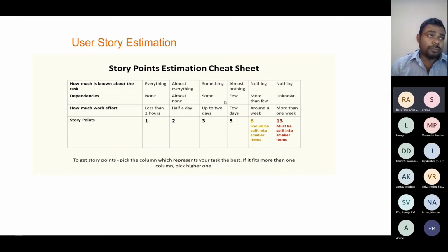So in such a case, if your story point is 5, think that it's big and try to split it, break it down into 2 user stories so that you can make it simpler and easier to test and easier to develop, and it makes the work easier. If it is 2, then it's all good to go. If it falls under 8 and 13, it's too risky to commit, because we are going to commit the sprint. That's our responsibility to deliver.